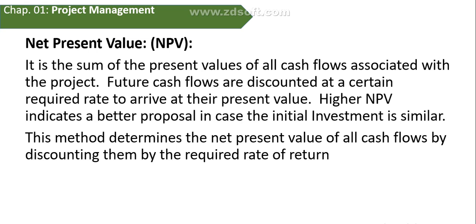Let me give the advantage and disadvantage of payback period. Advantage: easy to use and understand. Can be used as a measure of liquidity. Disadvantage: does not account for time value of money, and does not consider cash flow beyond the payback period.